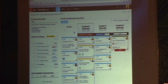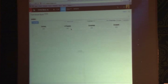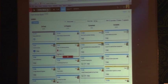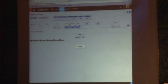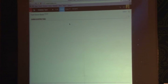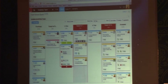It won't prevent you from overloading, but it will warn you. The same goes for the Kanban board — if we go over our WIP limits for any particular stage, it's going to notify you that you have gone over your WIP for that stage. It's not a hard line; it will allow you to pull something else in, but it makes it very visible that you shouldn't.